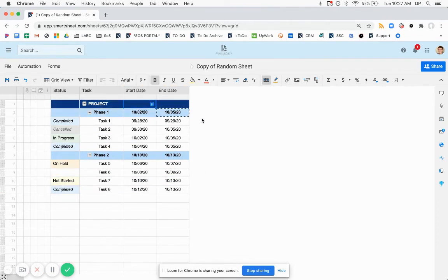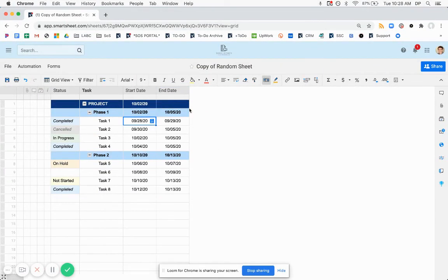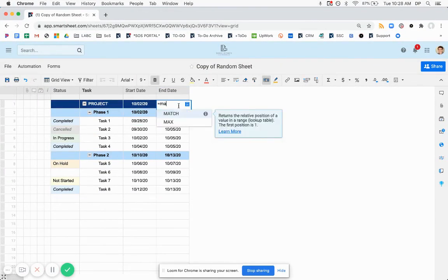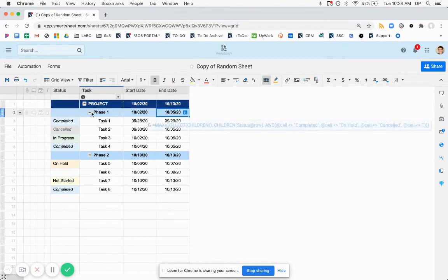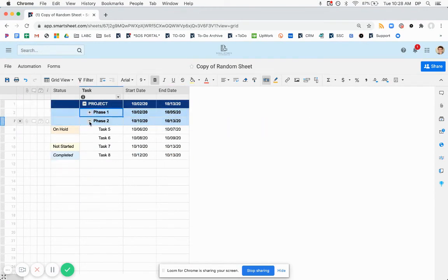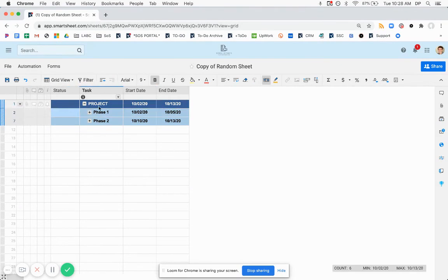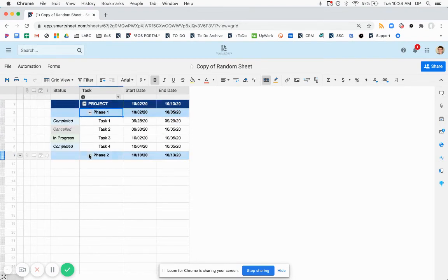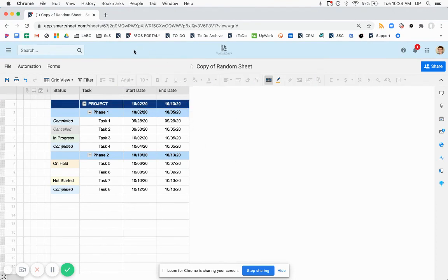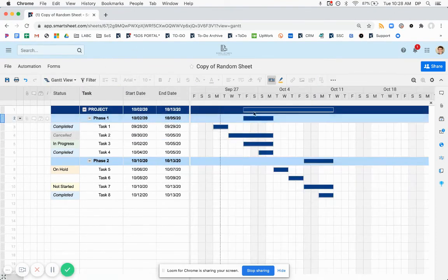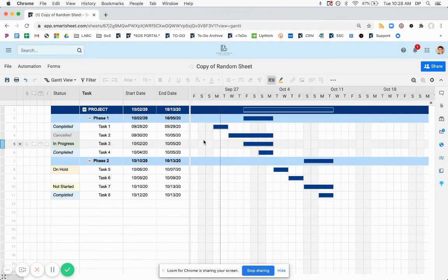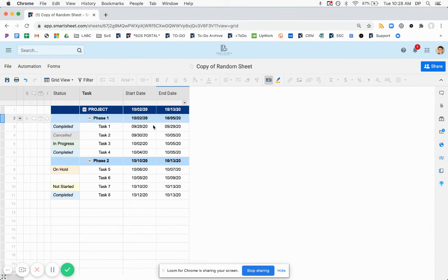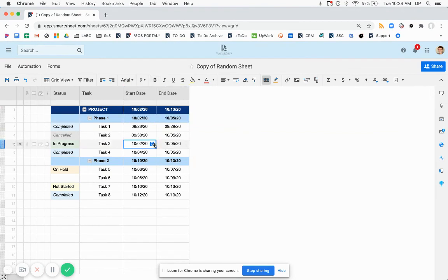And then on the project level, we can make this a bit simpler. If we just do a min children and a max children. Since we have multiple levels of hierarchy now, this row here is only going to consider these two. Because these are the two children of our first row. And these already have the logic built in. So by default, this will pull in the earliest and latest project dates. Open up your Gantt view and see the entire project as such. And now you have your minimum and maximum dates. If you add more levels of hierarchy, this will continue to work. You would just need to make sure this formula, whether it's min or max for the start or end date respectively, is put into your parent rows.